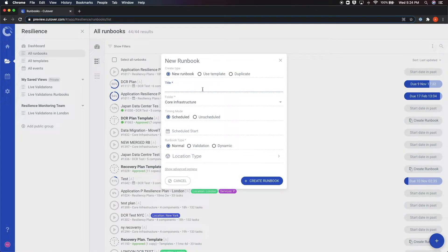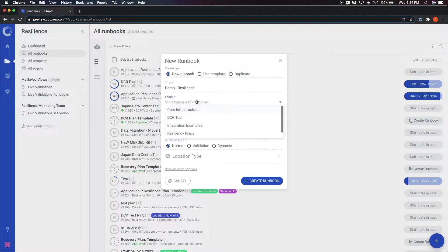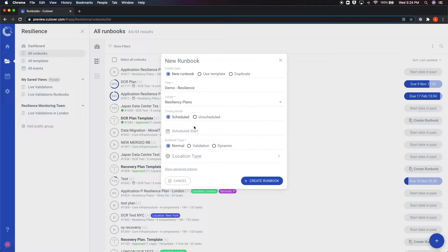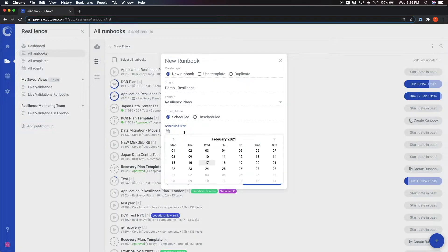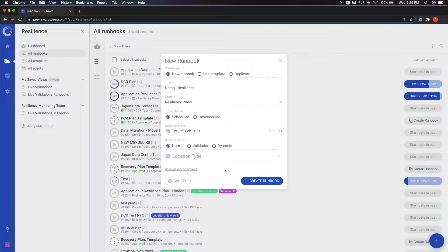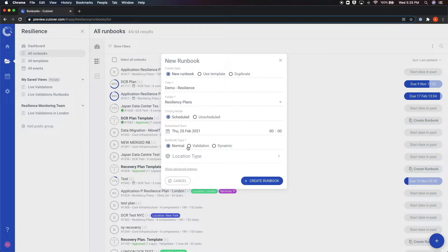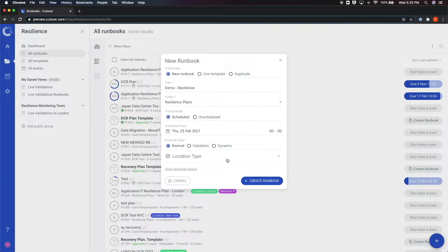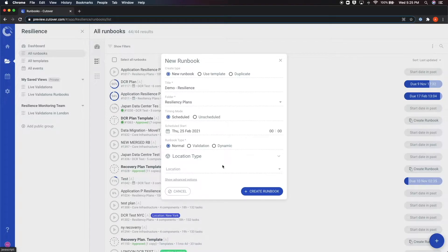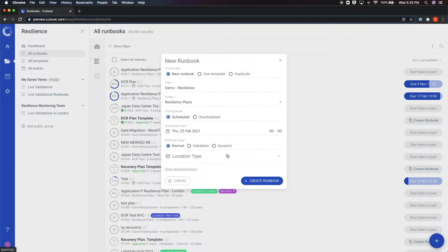Here, you can name the runbook, the folder where the runbook will be stored, and the scheduled start date for your event. You can also choose the type of runbook. This can either be normal or a validation runbook. Note that these are very similar. However, validation runbooks provide an additional dashboard that displays more data such as the result of validation tasks. If any other custom fields have been enabled for your account, they will show up at the bottom of this box for you to select. Note that custom fields can either be required or optional depending on their specific configuration.